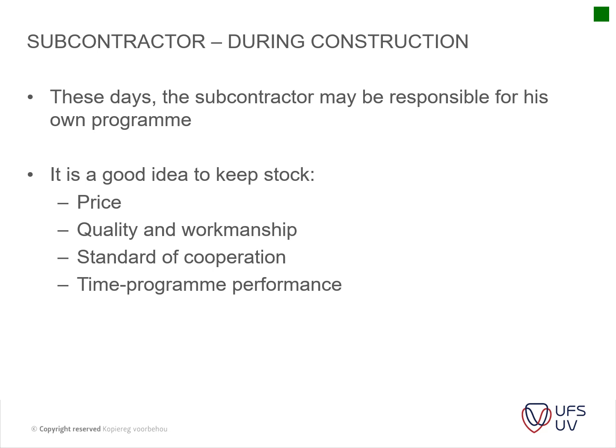Then it's a good idea to keep track of the price, quality, and workmanship standards and the time program performance of subcontractors. I've seen guys, if they've got vendors and subcontractors, they actually have a scorecard and a rating on them, so the guys can move up and down, and that information is usually very confidential.